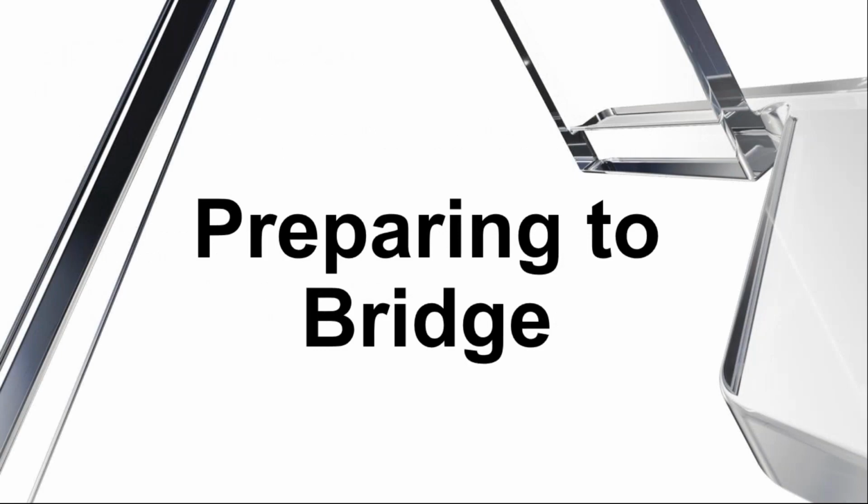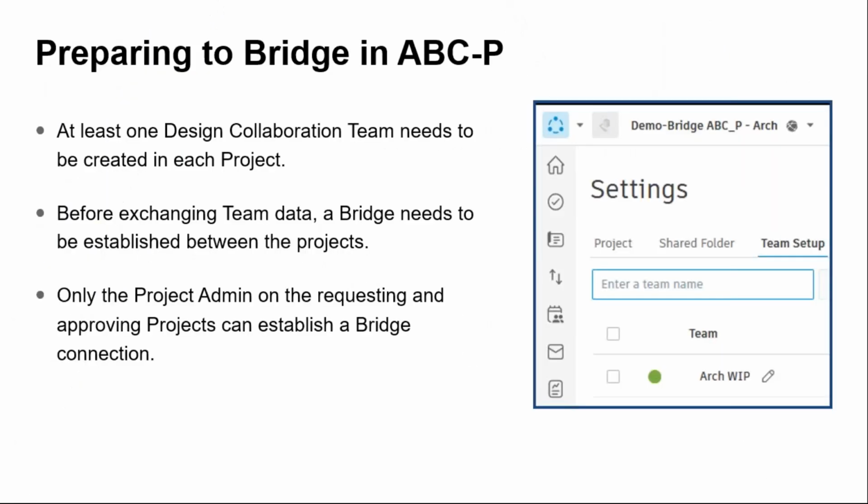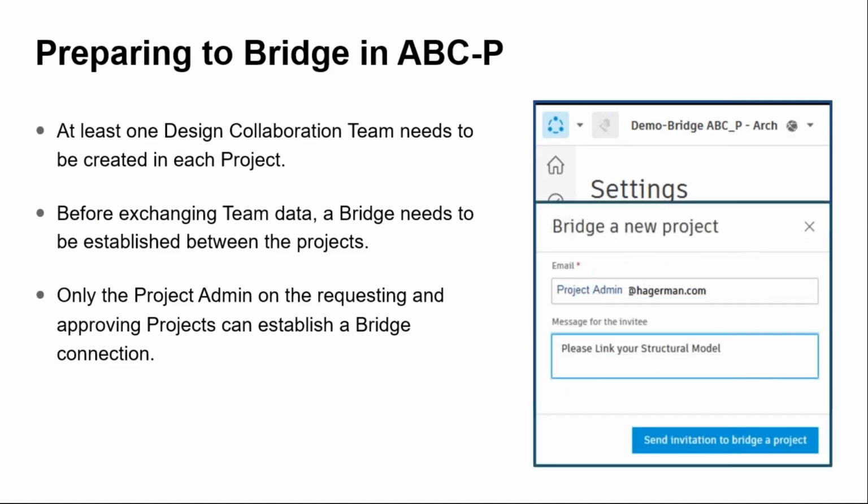Here are a couple tips. Each project admin needs to define a team to exchange data between projects. The project admin of the initiating project needs to know the email address of the project admin on the receiving project. Both admins need to know what the designated shared folder is in each project.